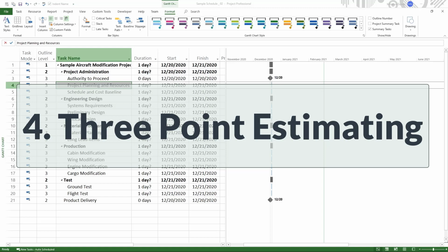For task durations, I would probably give a pessimistic view a heavier likelihood of happening than the optimistic duration, because usually something is more likely to go wrong than something to go really well and make a task go faster. Usually we use this 3-point estimating when we're using a scheduling risk tool to do scheduling risk analysis or SRAs. So this one is a very important way of estimating as well.